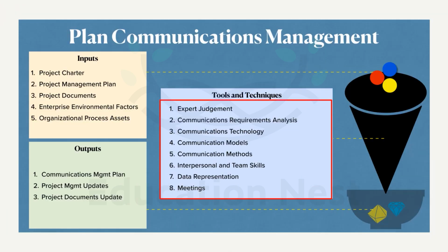The communication methods: this is typically talking about how the stakeholders are using the communication channels. Like, are they pushing the information or are they pulling it? Again, if we talk about the company brochures, the newsletters, the information about all the upcoming trainings, all these are considered to be the push method of communication.